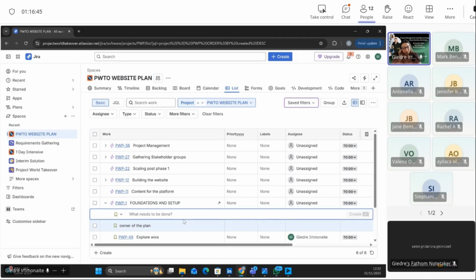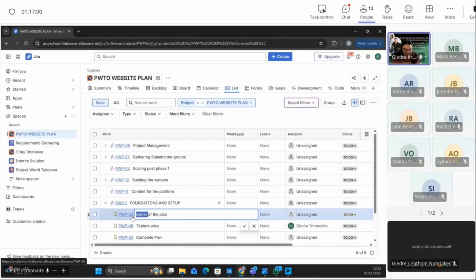And I know you're probably thinking, G should be you. Well, in project management, how it works in RACI, when we cover RACI, is there's someone responsible for doing the stuff and there's someone accountable for making sure it is done. So I want someone responsible. Maybe let's put this responsible for the plan, and then I'll be accountable for the plan. Essentially, responsible people are the ones that look after it. Accountable person is basically the person you want to shoot down if it's not there. That's how it works in project management.